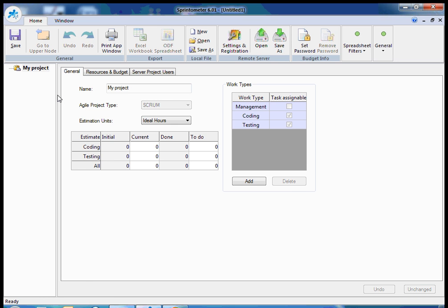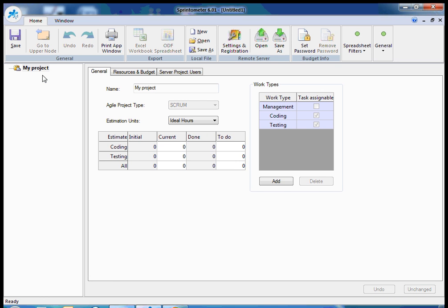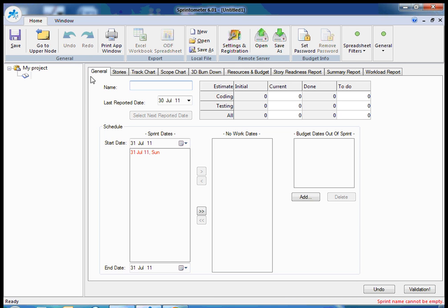Then I should create sprint, first sprint, and it's very important to define schedule for the sprint because the application should know which dates will be workdays for the sprint. And the schedule is defined by setting the start and end date.